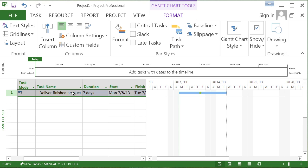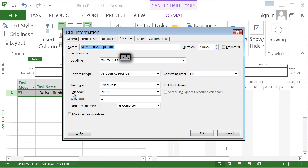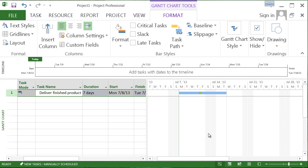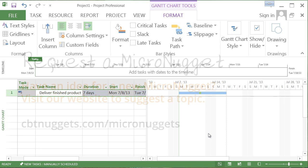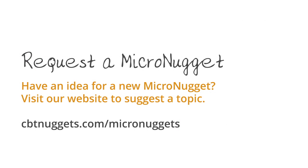So I suggest we should take advantage of this deadline oftentimes as opposed to setting a less flexible constraint type like must finish on inside Microsoft Project. Well, I hope this has been informative for you and I'd like to thank you for viewing.